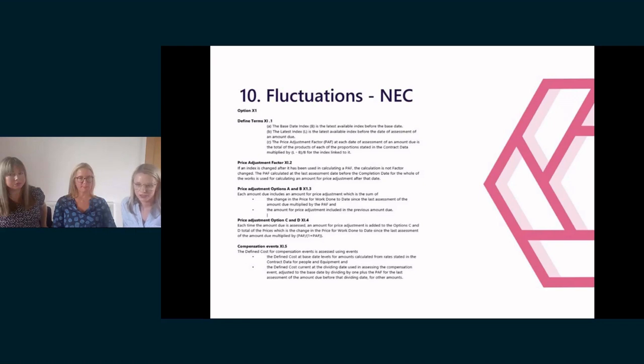One of the questions I'm reading here is about withholding a 10% sum only: should the withholding provision reflect that the bond sum is only 10% of the contract sum, so that it's unreasonable to withhold the whole sum? From a contractor's perspective, I completely agree. The issue we always come back to is that providing the bond is a requirement of funding, and if we're not getting the funding drawdown, no one's getting paid. So that's why it's always a full withholding provision.